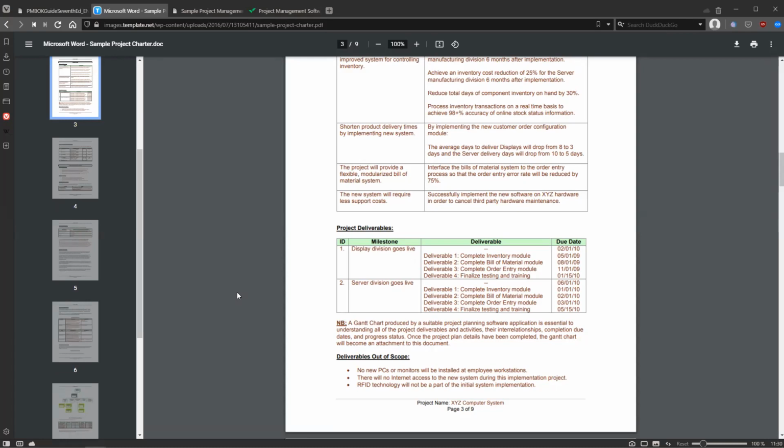In some major projects, where actual changes were delivered to customers, it was explicitly stated in a contract, let's say one month after go-live, that the project team provides assistance to the support team, to the customer team, for the project deliverables. If something is not documented and not agreed upon by every relevant stakeholder, then it's very hard to influence. Therefore, that's again the job of the project manager to document and make sure all the agreements are captured and agreed upon.